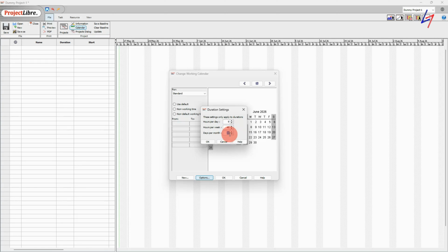And if I'm looking at Indian context or most of the Asian countries context, we work 22 days per month. So I'm going to put that in here. And I'm going to say, okay. So now I have created the base that is required for my new time calculation.